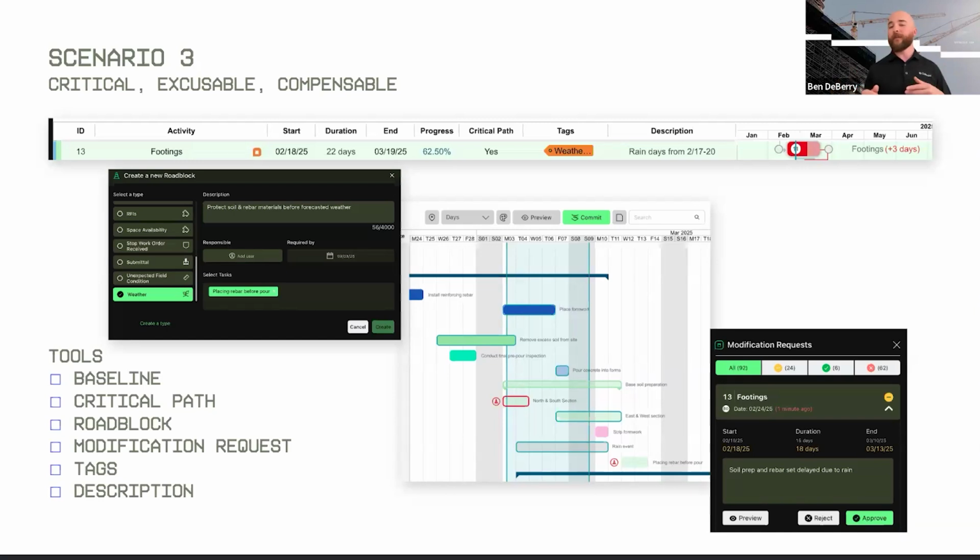And then only if that delay is pushing down the line, you submit that modification request, which is this item right here, which then ultimately impacts your contract schedule, which is going to be your source of truth for gaining those compensable and excusable dollars or bits of time or delays. Awesome. Thanks, Liz. Glad you're asking that question, that you want to keep that data clean too. That means you're thinking about using it the right way and making sure the story's straight.